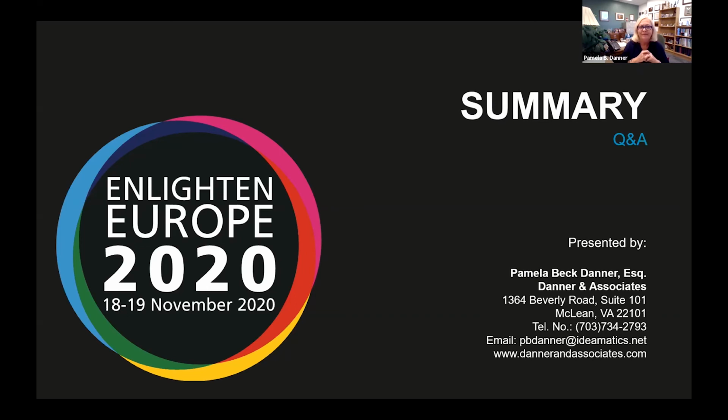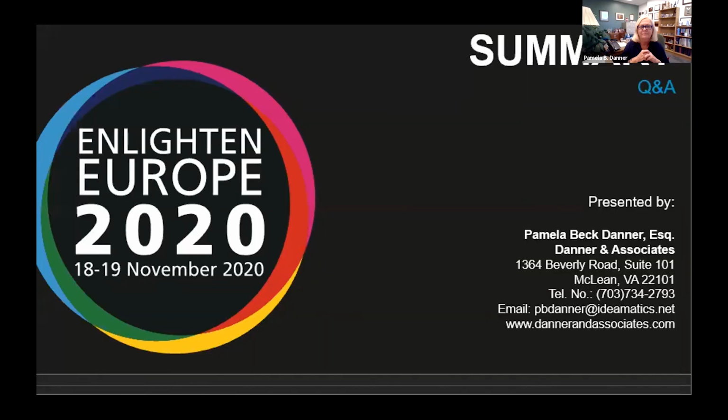Great. Thank you for that. Here's another question. What do you suggest in the case if the contract details are not yet signed and the project is requesting to start the design process? That is not a good idea. They need to sign the agreement before it starts. I have seen where lighting designers will go forward without having an agreement signed, and we'll still be working on the agreement, but you're at risk if that occurs.